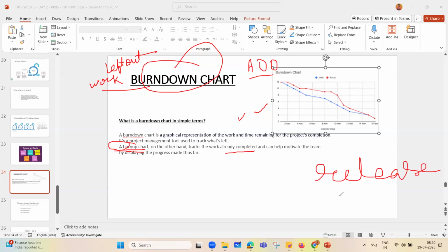At release level. Imagine if there is a monthly release cycle. At the release level, this is checked by the seniors, and even the Scrum Master presents the release burn up chart. That's the reason the term release burn up chart is there. And when it comes to the burn down chart, it is checked at sprint level.